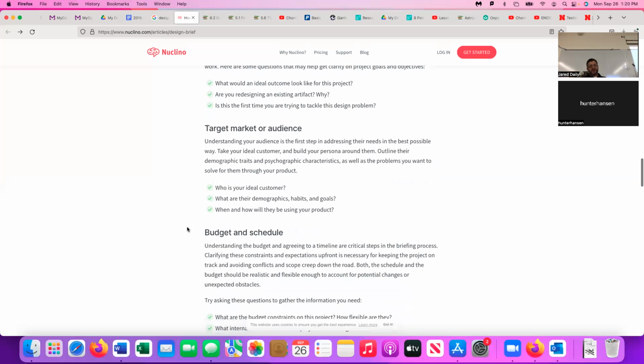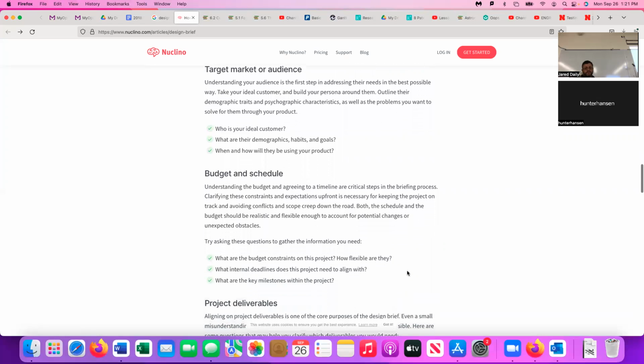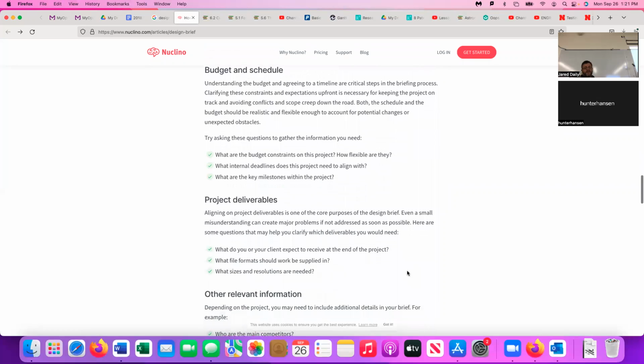And a budget and schedule down here. So this part here, we usually have a budget that is set by our client. We usually just don't have as much money as we need, unless you're in the drug industry. But in this case, we have budget and schedule, so we have to choose the amount of money that we can use on the project, and that choice is usually made with our client. They tell us how much they can spend. We tell them how much we can do it for. Usually those numbers are fairly far apart, and we have to arrive at something in the middle.